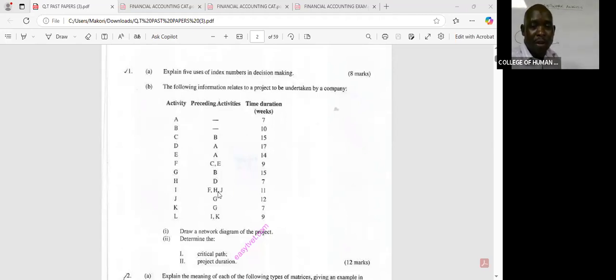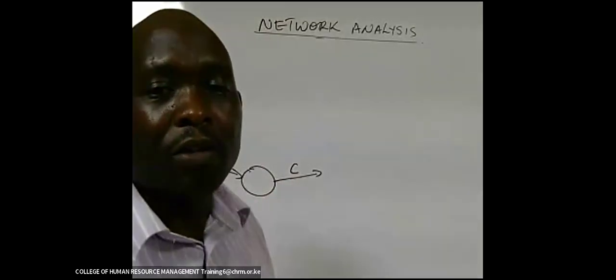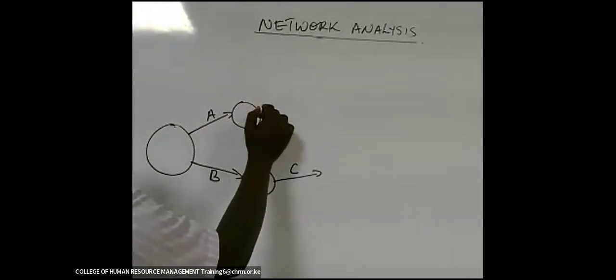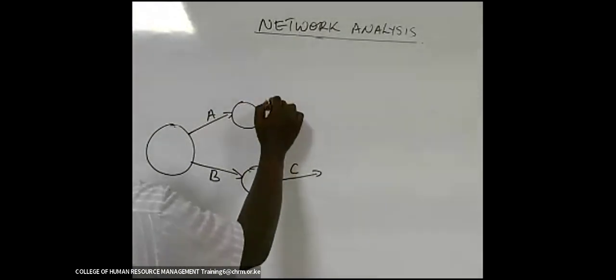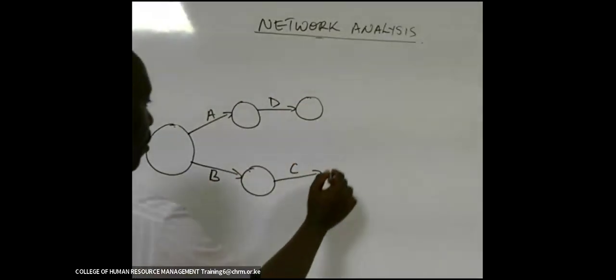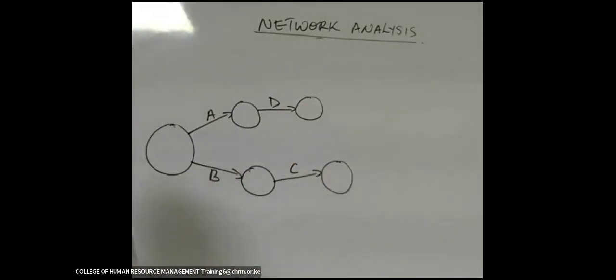You look at those activities that are combined here. There is nowhere D is combined with these three activities already completed. So D will start after A has been completed, and it is not going to be combined. Like that.